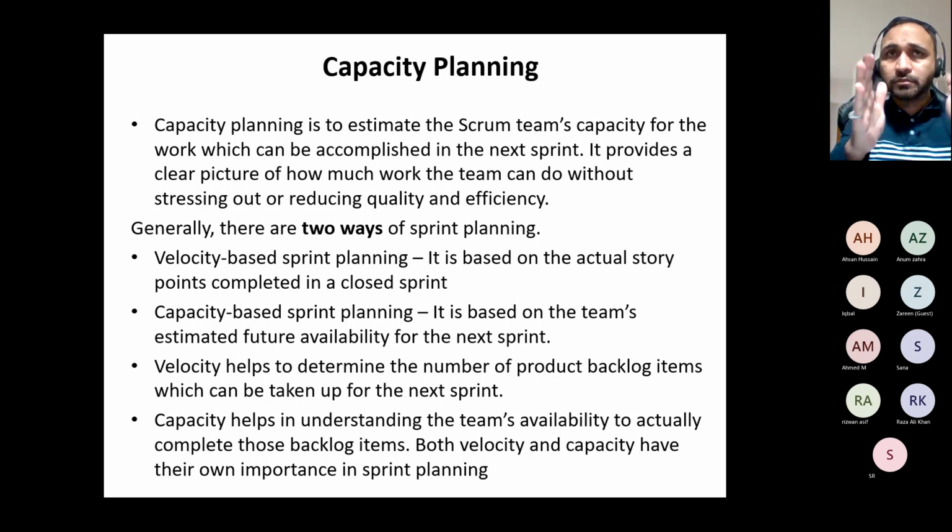For example, in one sprint, you delivered like 40 points. The other sprint, it was good. It went up to 55 points. But it's not always the case, right? You do the average and calculate and come up with your average velocity that your team is delivering. It will give you a rough idea and a starting point where you can commit and start your sprint.